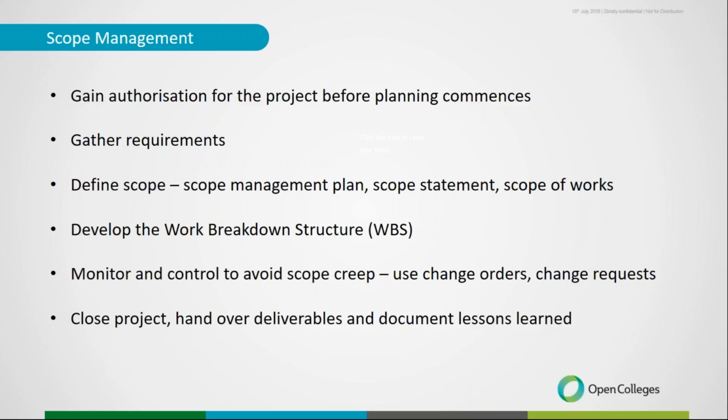But as long as the change control process is formally engaged, so change orders, change requests, etc., and changes are made through a formal process where they are documented. This is the change: we are going to be adding this feature or adding this to our scope. If you are expanding the scope, for example, you use a form and put it through the formal change process.